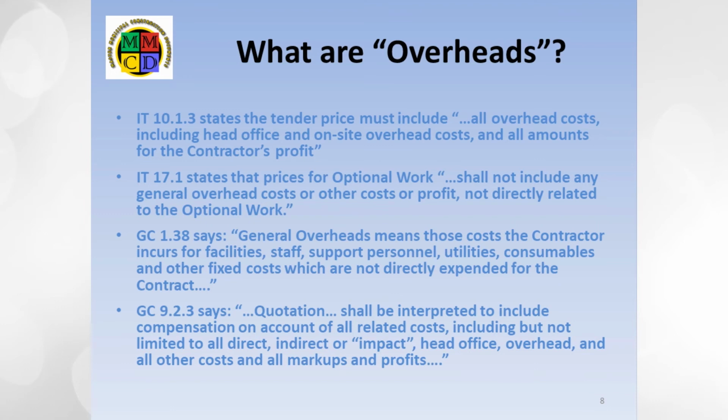It is worth noting that when bidding, estimators will apply their markups for general overhead and for profit to all costs, including site overhead items. The site overheads are true project costs. They are just not specific to any one work item. They are hard, out-of-pocket costs on which markups are entitled.